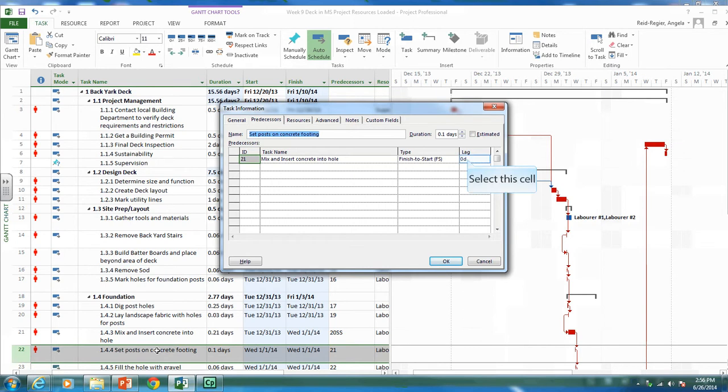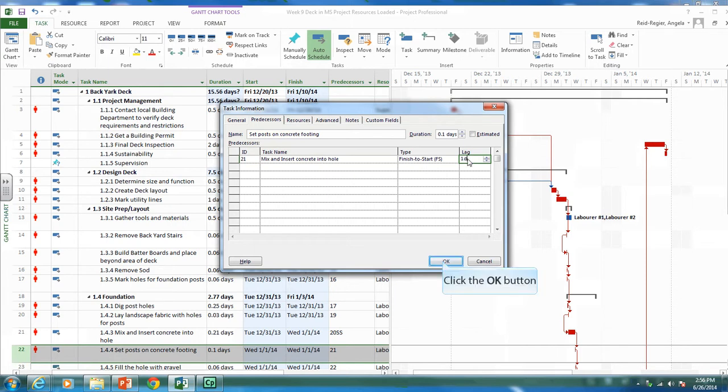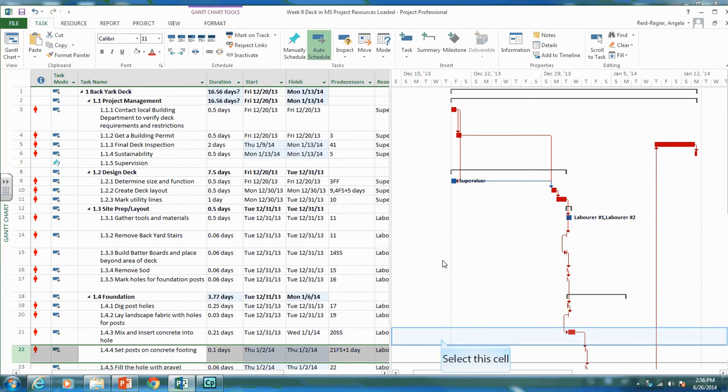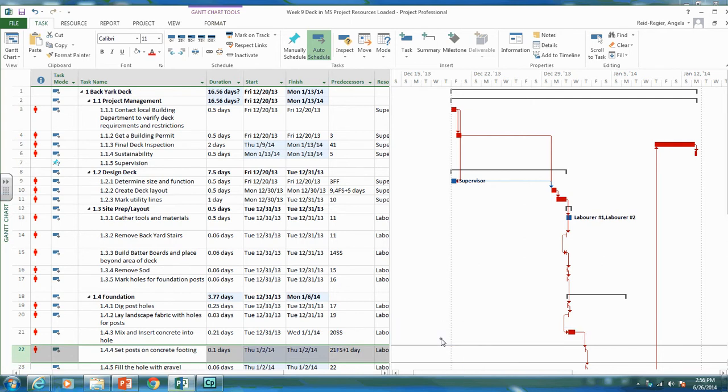We should have to wait. It's usually a day or two for the concrete to cure, so let's put a one day lag here. We can't set the post on the concrete until the concrete has cured. So we have a finish to start relationship with a one day wait. Again, it's really important that you put the lag with the succeeding activity.